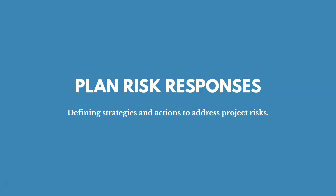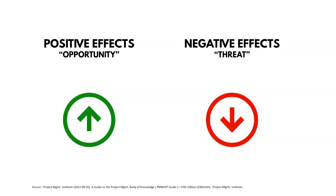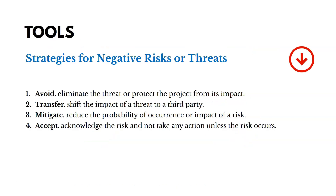Now we talk about planning risk responses — defining strategies and actions to address project risks. Key inputs are the risk management plan and the risk register. Risks with positive effects are called opportunities; those with negative effects are called threats. Strategies for threats include: avoid (eliminating the threat altogether), transfer (shifting it to another party by paying them to handle it), mitigate (reducing the probability or impact), and accept (acknowledging you can't address every risk and taking no action).